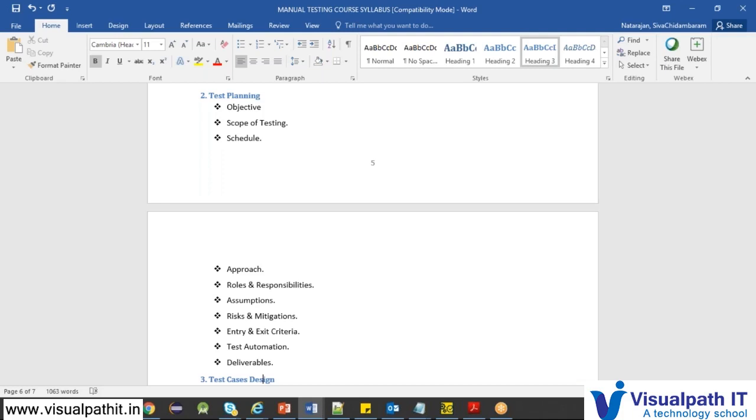Normally the application, the test cases, the test plan, the estimation, everything will be the entry criteria for any testing. So what will be the exit criteria? Exit criteria will be the test report and test results, and they will give the test case pass and fail criteria to the client. So in exit criteria there might also be the test plan and the testing traceability matrix.